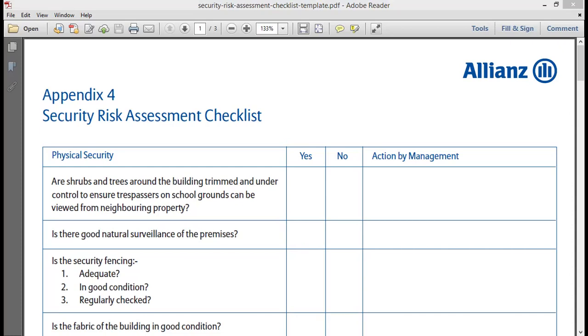So if you go to the PMBOK guide, page 414, it says checklist. A checklist is a list of items or points to be considered. It is often used as a reminder. Risk checklists are developed based on historical information. And that's really it. So while a checklist may be quick and simple to use, it is impossible to build an exhaustive one. The project team should also explore items that do not appear on the checklist.